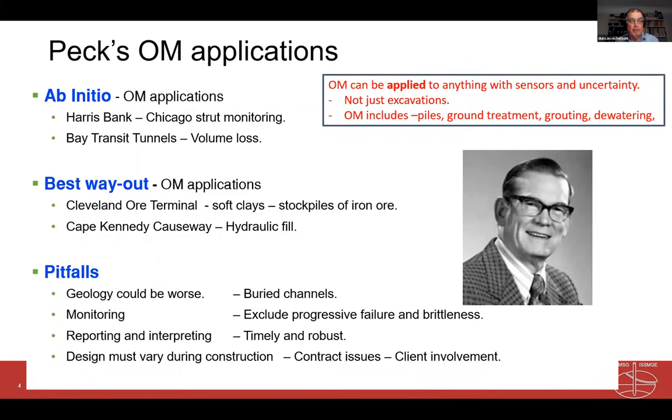He also identified pitfalls, which is where the geology could be worse, and that's buried channels often associated with the best way out options. Monitoring: if there's a risk of progressive failure or brittleness, then that could happen too fast and you can't put in place contingency plans. Reporting and interpretation is important because we need timely and robust change to make sure we can do that quickly. And Ying will talk a bit more about that in due course. And the design must be varied during construction.